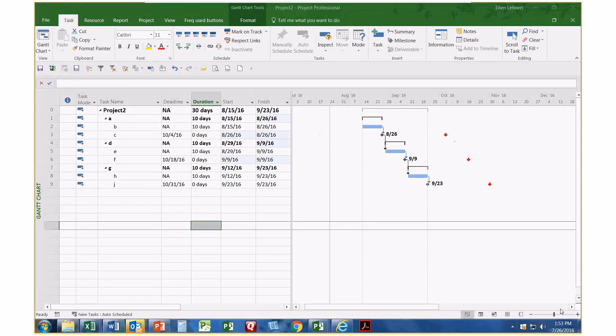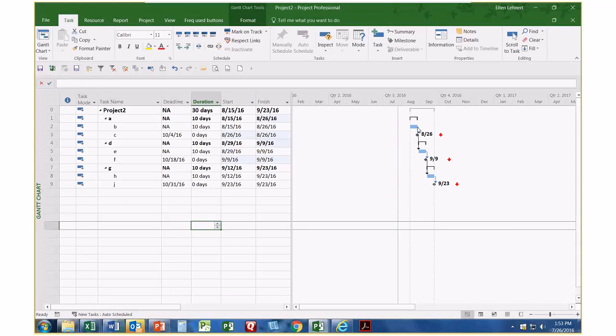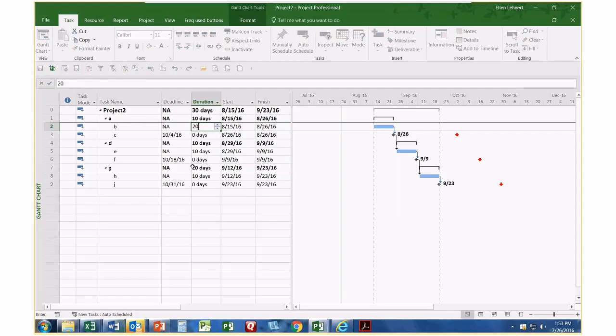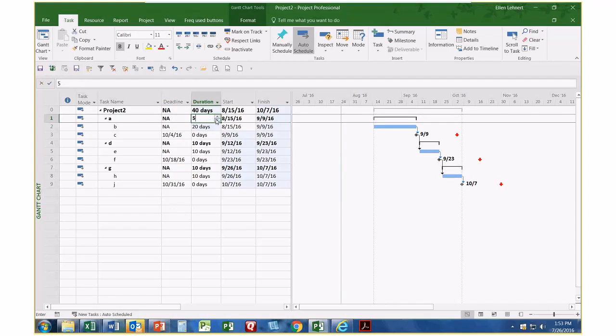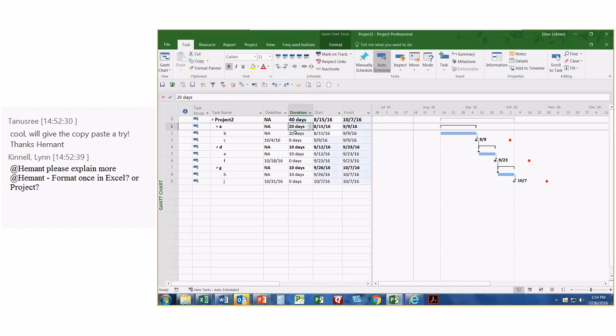Now you can see that as long as this milestone doesn't cross this arrow, I'm in good shape. I can go ahead and manage my project. Maybe this task is going to end up taking longer, which is still fine. I'm not in trouble till this milestone crosses that arrow. If something comes up and the milestone does cross the arrow, and I just hit the wrong thing, sorry about that, guys. Let me just try that one more time.